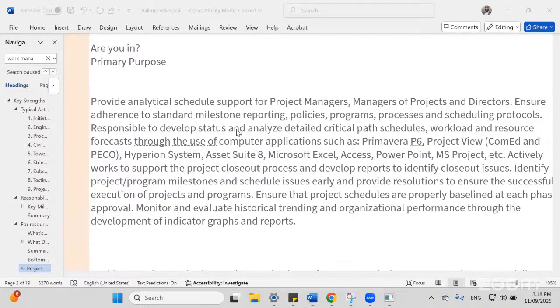It means weekly how much resource we require, what type of resource we require, or daily what kind of resource we require. Whenever we assign the resources, I think we have discussed the stack histogram. And after the stack histogram, we extracted those resources into Excel. The histogram we plotted in Excel is called resource forecasting. In that we forecast weekly or daily how much resources we require, depending on project duration.